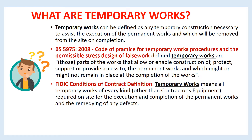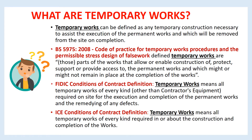The FIDIC Conditions of Contract defines Temporary Works as all temporary works of every kind, other than contractor's equipment, required on site for the execution and completion of the permanent works and the remedying of any defects. The ICE Conditions of Contract defines Temporary Works as all temporary works of every kind, required in or about the construction and completion of the works.